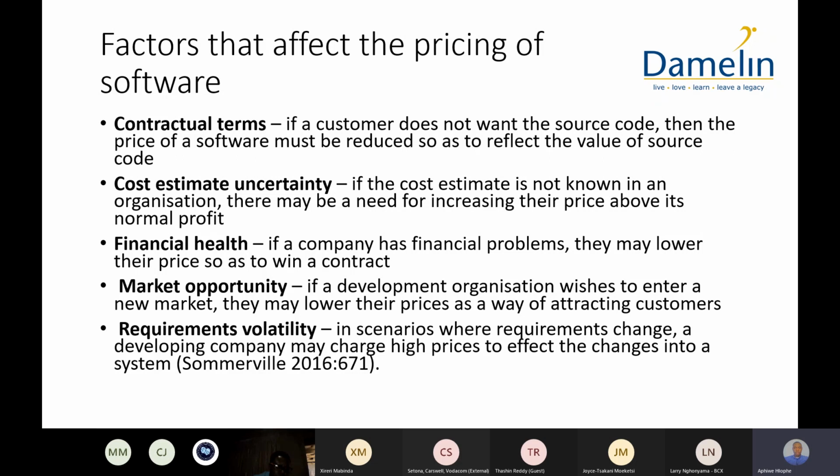Okay, the client cannot state the nature of what they want to be done in the organization. So you also need to cover yourself by pricing the software slightly higher than how you normally do, so that as the project progresses and the client starts revealing certain details, you are able to cover the costs of that as well.